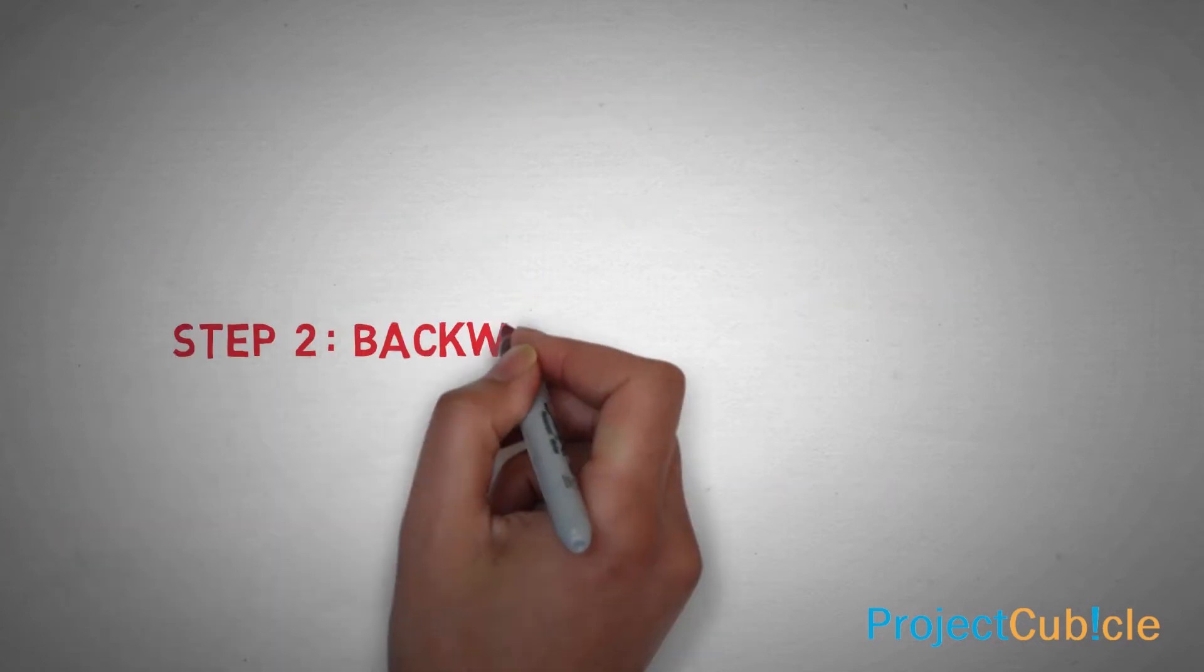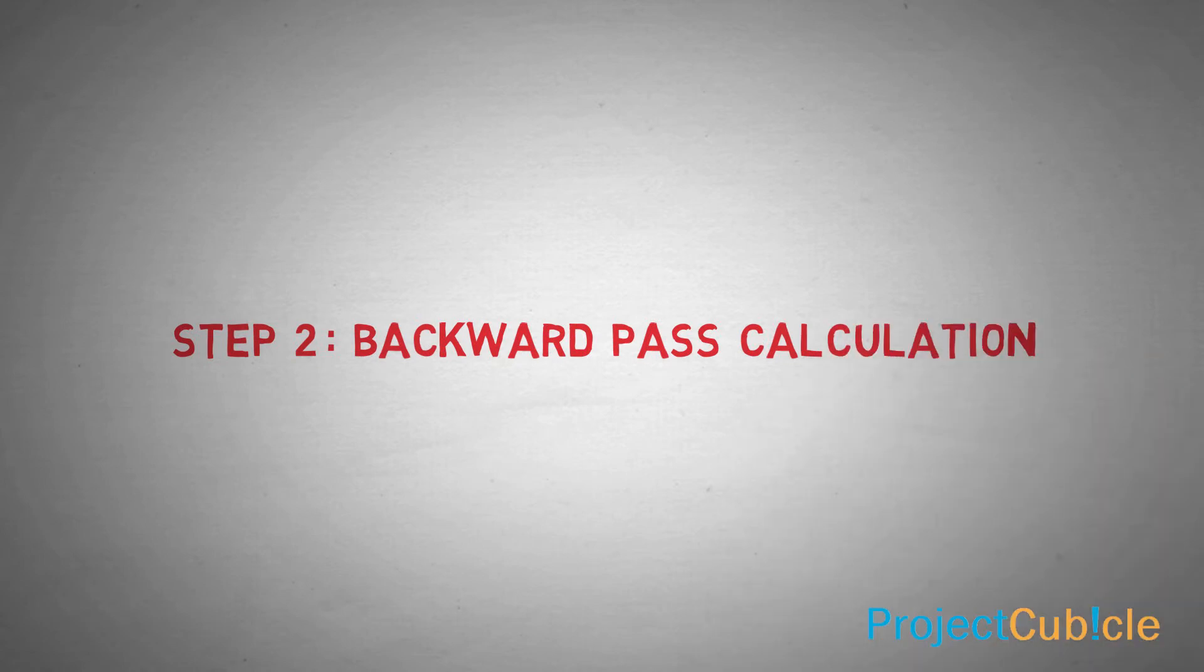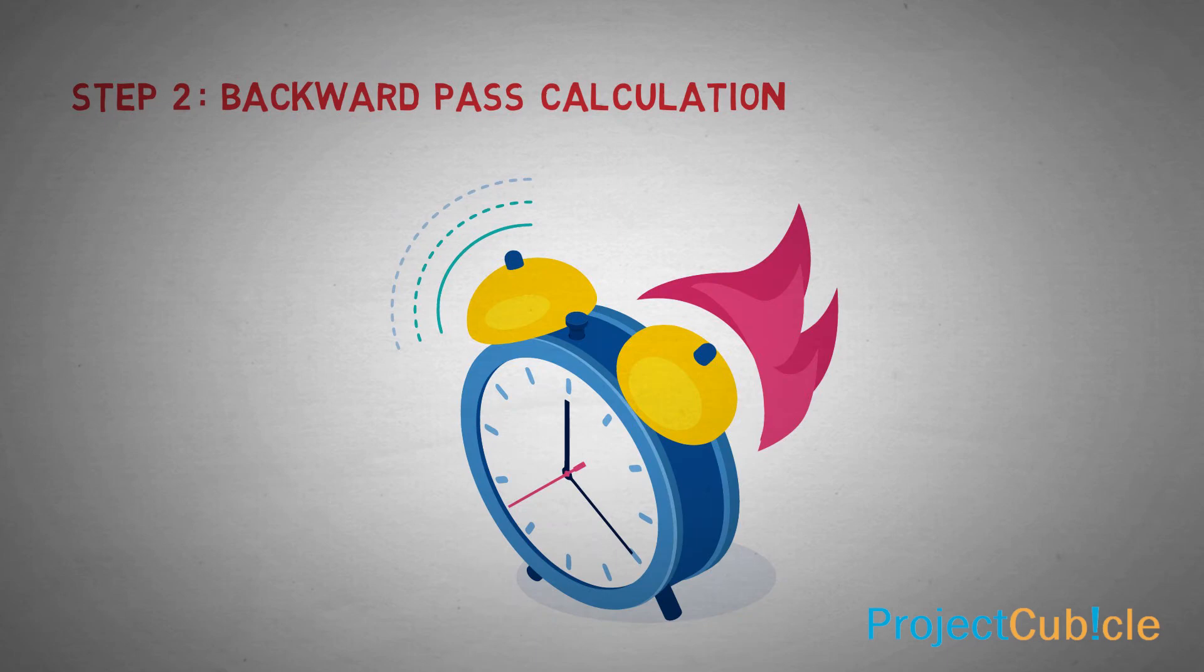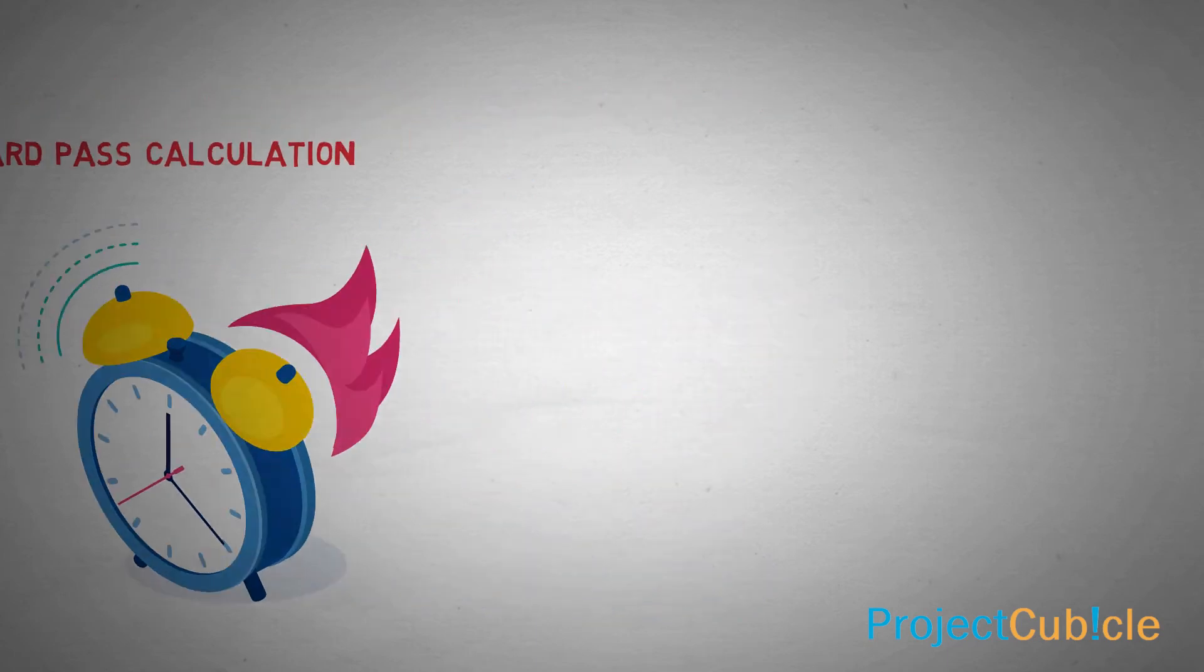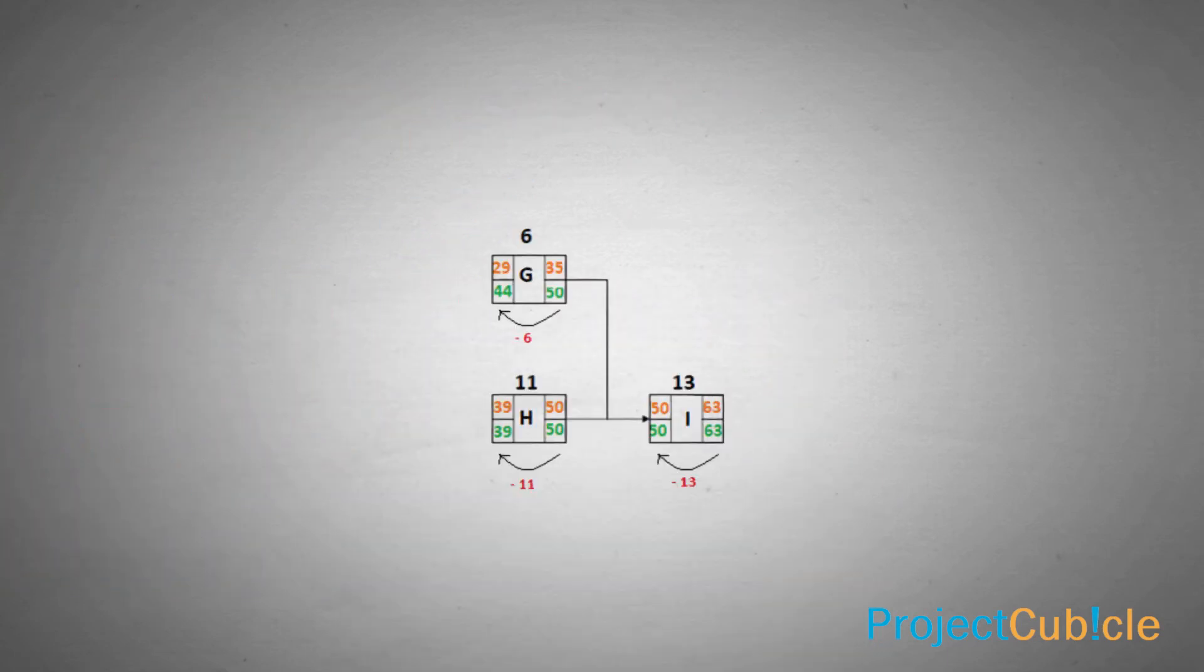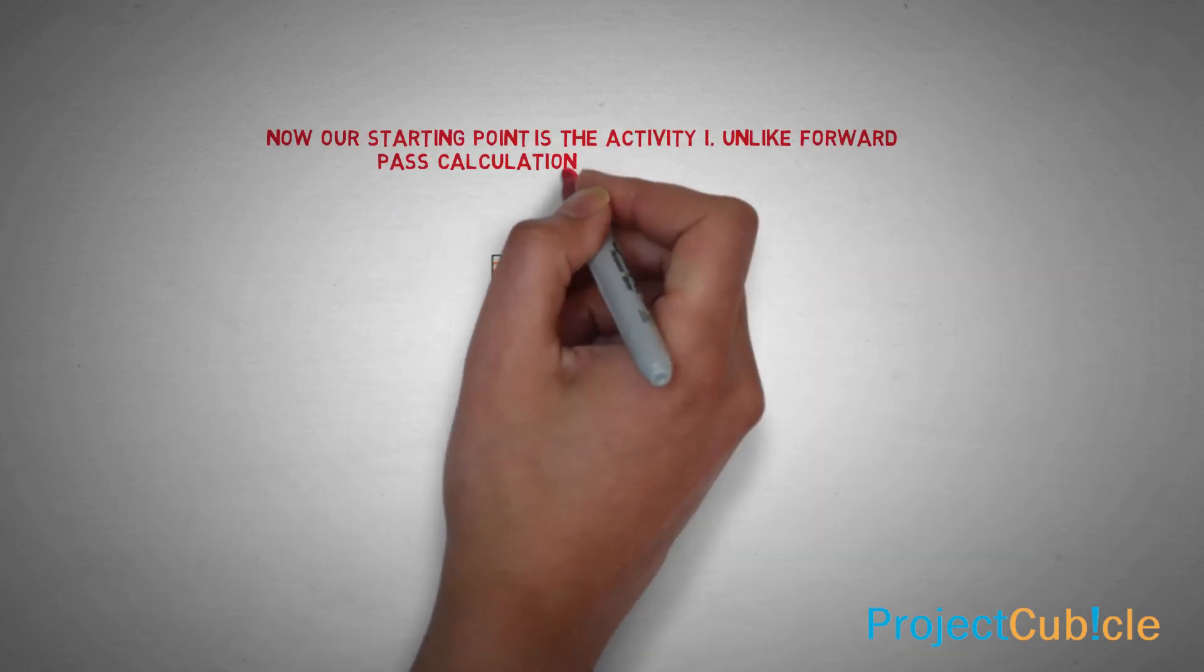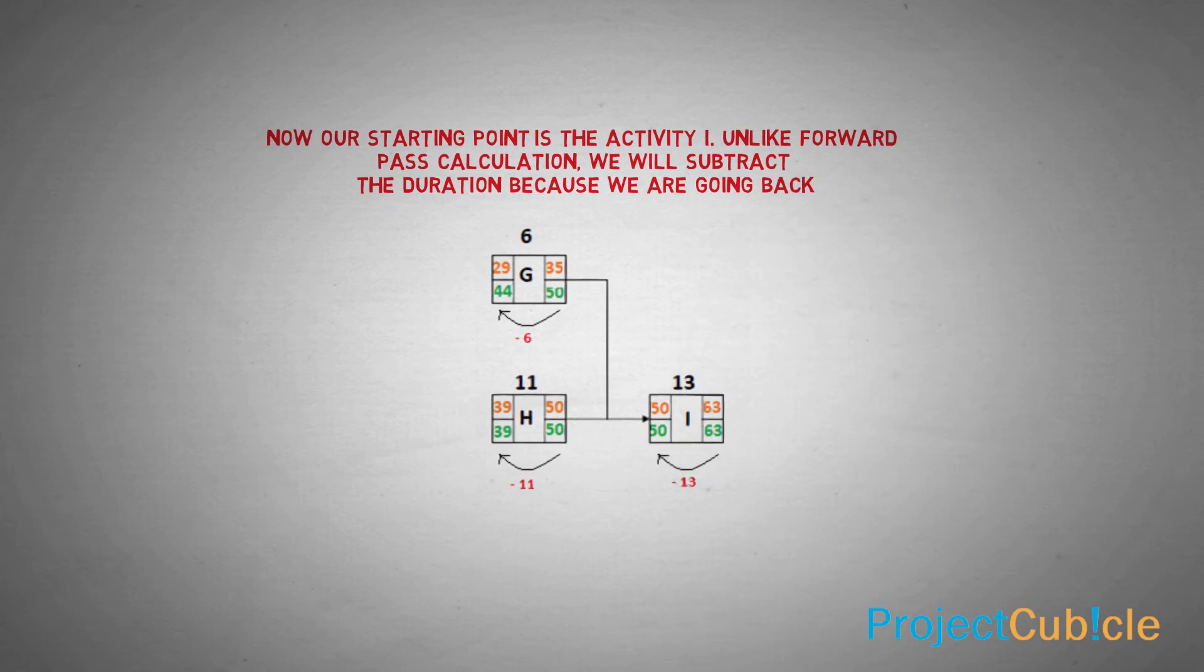Step 2. Backward pass calculation. Backward pass calculations determine the latest dates by which each activity can be performed without increasing the project's minimum duration. Now our starting point is the activity I unlike forward pass calculation. We will subtract the duration because we are going back. For the activity I,